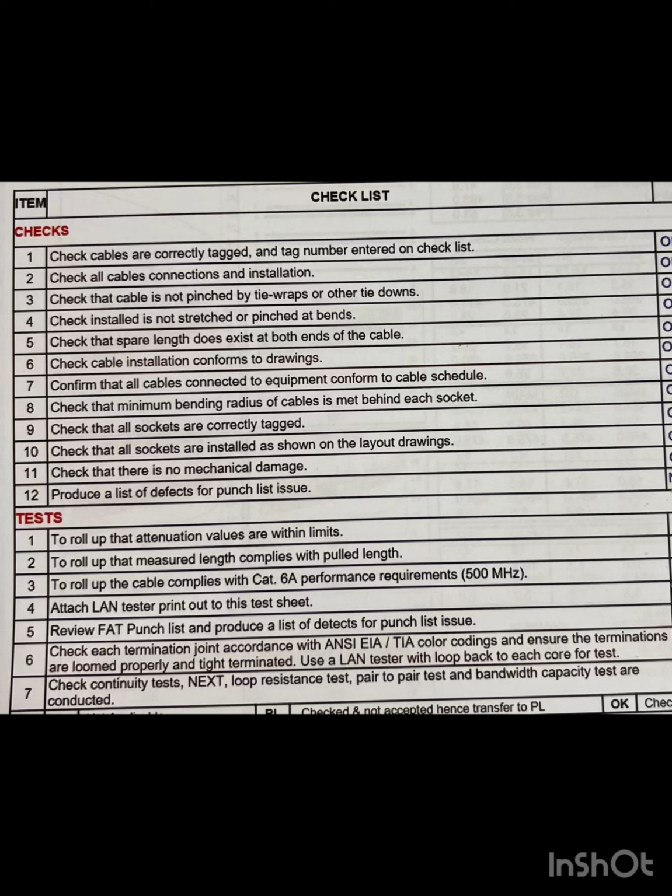And check that all the sockets are correctly tagged. Check for any mechanical damage. Okay, so for any issue, any problem, any discrepancy, you need to provide a punch list. So write down the punch list.